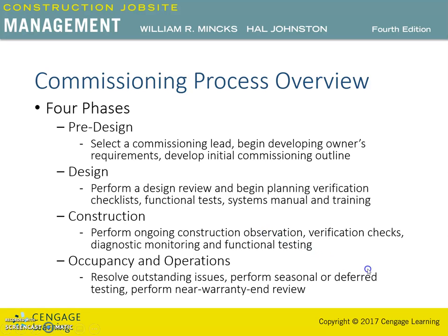It is interesting to review the list of activities or tasks that are to be performed during the construction stage. All these activities are normal activities with the exception of develop commissioning report and systems manual and develop recommissioning plan. And even those two activities are not completely out of the normal tasks required by the specifications. Having a system manual could be required and often is required as part of the owner operation manual.